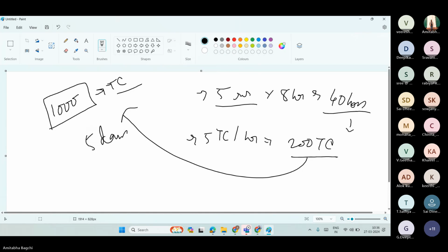5 days, right? Yes, 5 days. Fine. Because there is plus minus 500, I'll also keep the buffer for them. I don't want to suffocate them. I'll keep 2 days more buffer. That's how I'll give us 7 days of approximation.